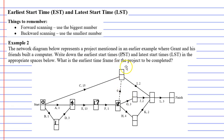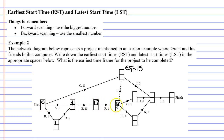Looking at the vertex up at the top, there are actually two paths we can take to get here. We can go along activity C, which takes 15 minutes — an earliest start time of 15. The other path goes through here and up through the dummy activity. There's actually more than two paths, because you're either going through activity A then up, or through activities B then D across and up. So 18 plus zero gives us 18.